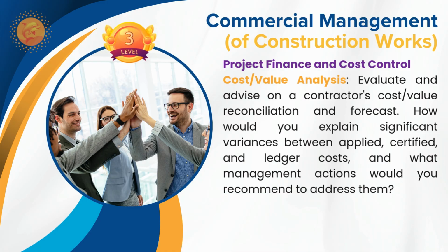That is not the case, because you may find some of the methods that are cost saving for you to achieve and deliver the same deliverables as per your specification requirements. So here your budget is something that is exclusive of your profit, overhead, and then contingency allowances. The remaining is your budget for the project.